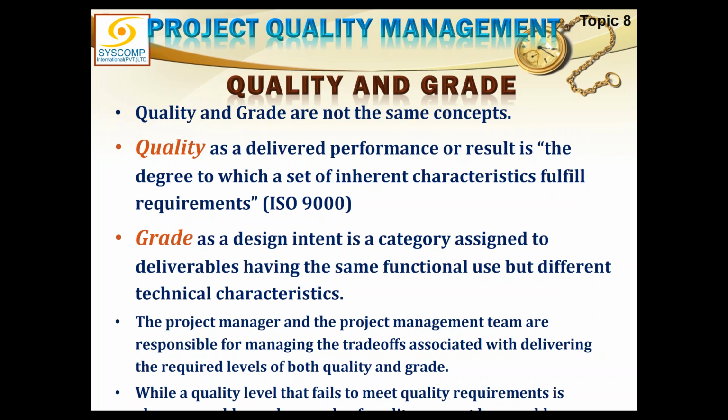You see, we are misusing this word grade. Basically, grade would mean this is a pen which can write in blue ink, right? Say this is one function, and it can only write in red ink. If there is another pen which can write in red and blue, that would be another grade. So that should be compared according to those characteristics for its quality. As far as the gradation is concerned, the pen having two different colors is of a higher grade. But whether it can write well, is the flow of the pen all right? That would determine its quality.